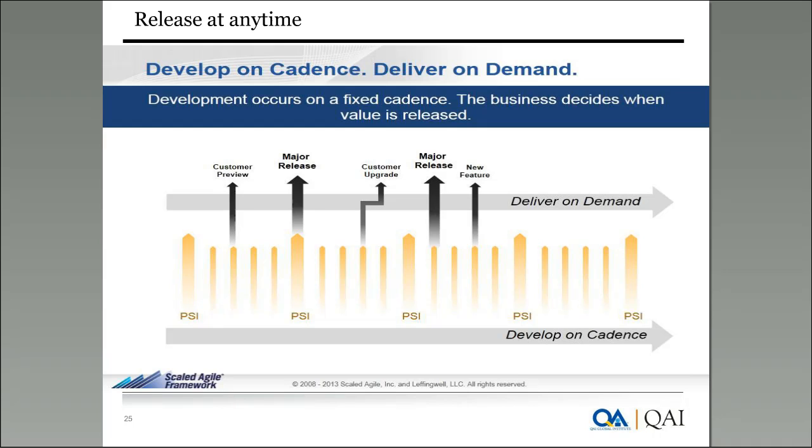As I was saying, a program has a very clear 2-week cadence most of the time, and all the teams follow the same cadence so that they all start their planning and demo in a 2-week time frame, and they keep delivering.